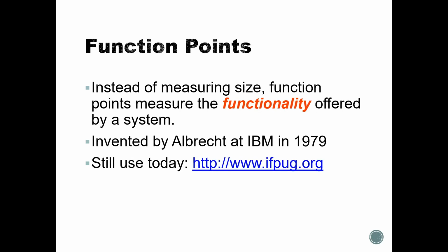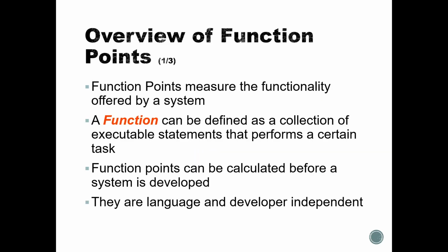So the first one actually is the function point. So why do we measure size? It's easy to measure size. But how about the functionality offered by the system? So it's really simple calculation. What happens when we use this thing? The function points are inputs, outputs, abilities to do something, the amounts of files we are using, the amounts of files we are creating.